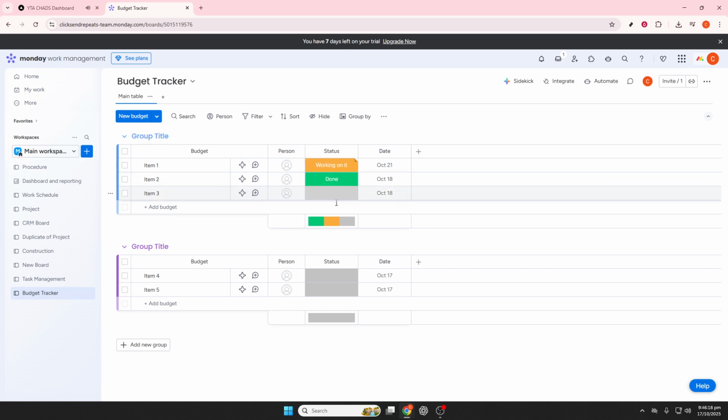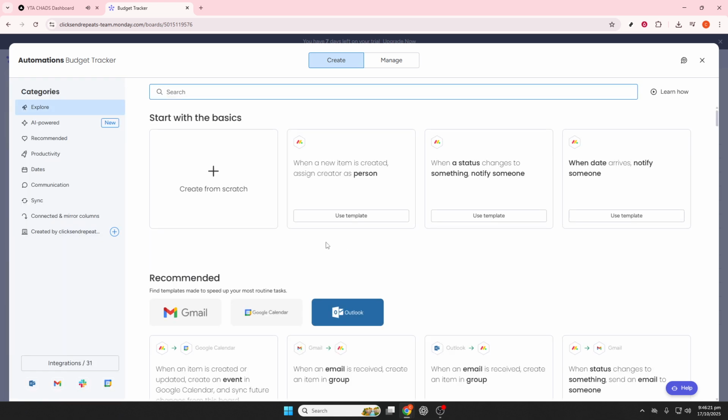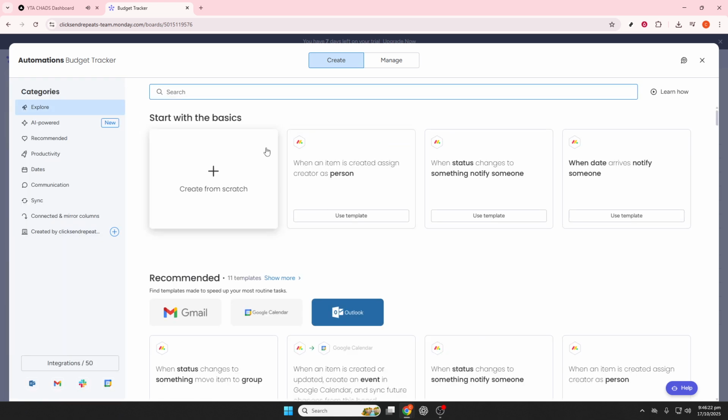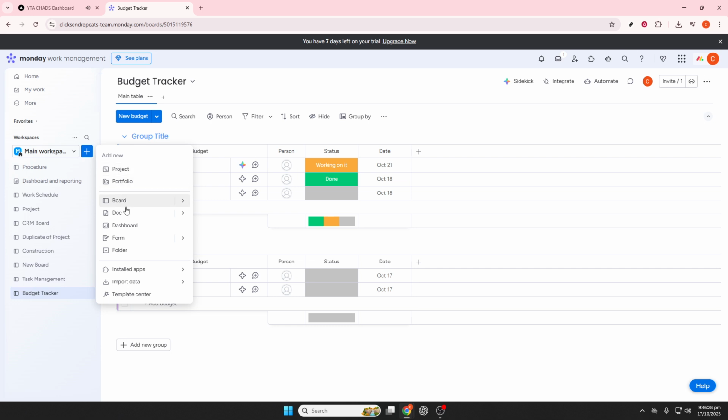Now, it's time to track your progress with dashboards. Create a new dashboard and populate it with widgets that'll offer insights at a glance. Consider using the battery widget for visualizing overall completion, the timeline widget for milestone tracking, and the chart widget to illustrate departmental progress. These dashboards provide executives a top-level snapshot of strategic performance.